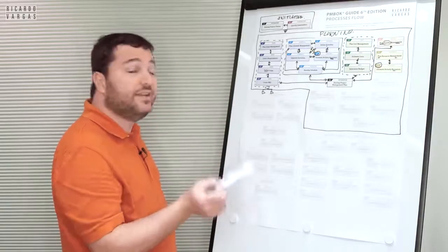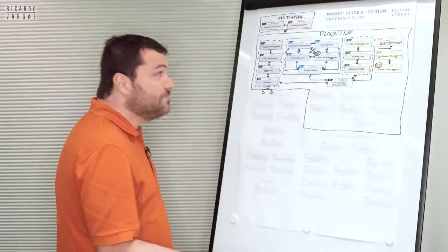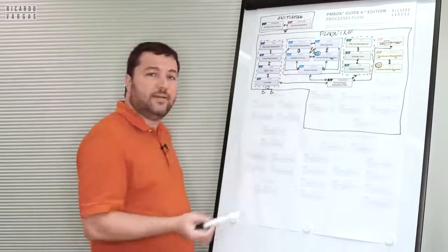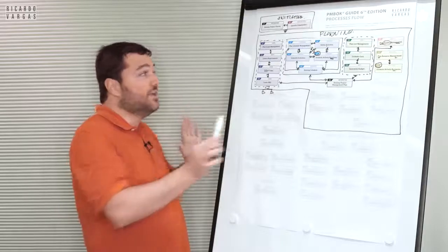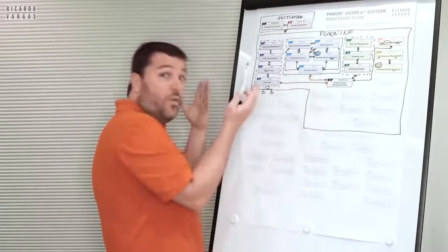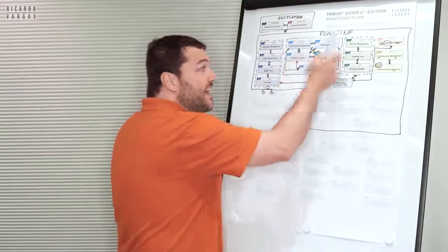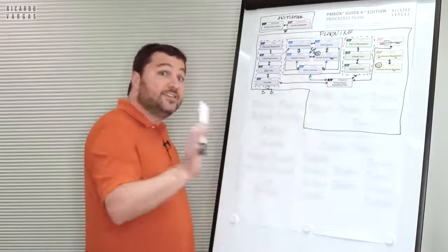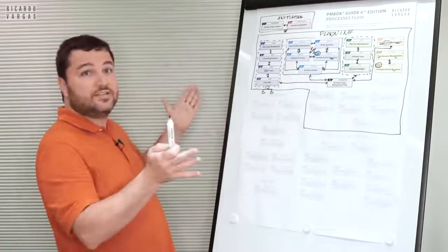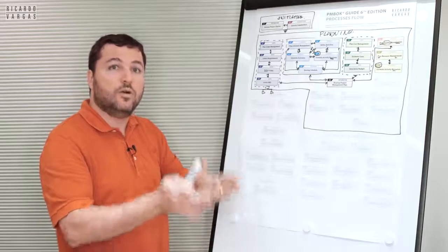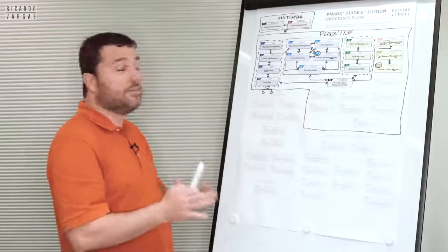When I say effort-driven, I'm saying if you add more resources, you reduce the time up to a certain level. So this is why it used to be together. Now it's in 2 different areas. Does it mean that you will need to do it separately? No, never. Think about that.